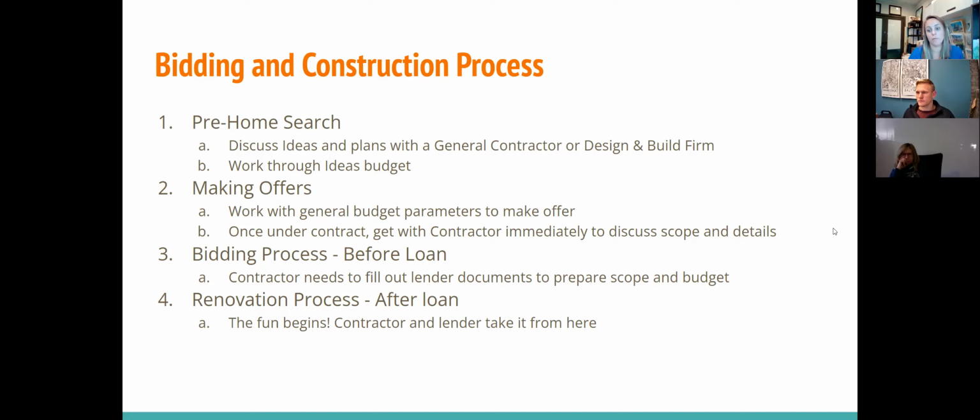For example, if you went in there and said, oh, I wanted to leave 2 bathrooms and not finish the basement, and then you're in the process of the loan and the project, and then say, hey, actually, we wanted to finish the basement, and add a bathroom. That's a pretty big difference, and there's no guarantee that the loan can change at all at that point, or that there can be more budget for it.